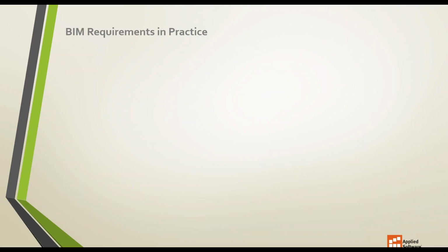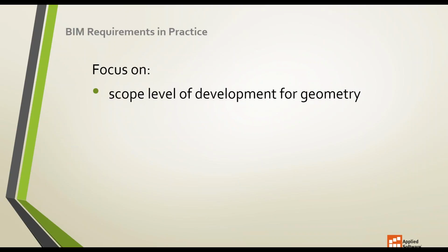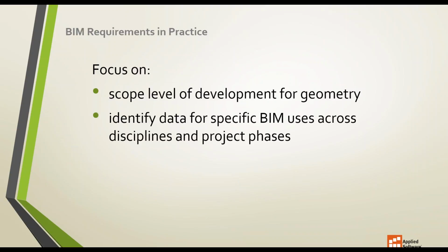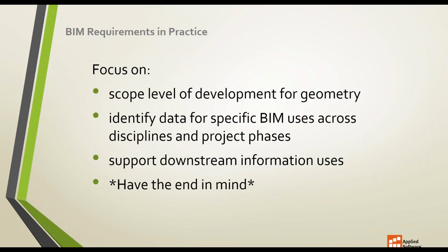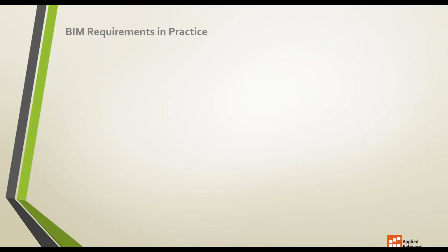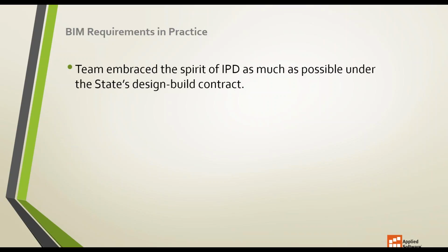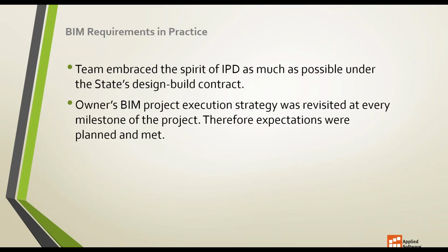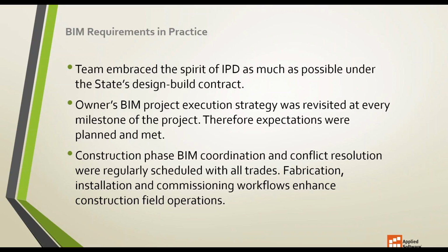BIM requirements in practice. We want to focus on sophisticated organizational and project team BIM planning, allowing the teams to scope the level of development for geometry. They could then identify data for specific BIM uses across disciplines and project phases. Having the end in mind was a key driver for supporting downstream information uses. The team embraced the spirit of IPD as much as possible under the state's design-build contract. The owner's BIM project execution strategy was revisited at every milestone of the project. Therefore, expectations were planned and met. Construction phase BIM coordination and conflict resolution are regularly scheduled with all trades. Fabrication, installation, and commissioning workflows enhance construction field operations.